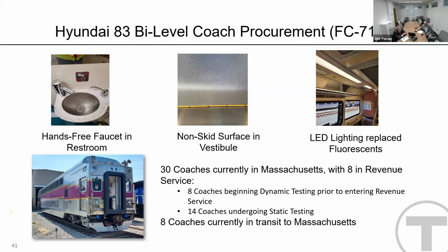We've got 8 coaches that have entered revenue service, and we're dynamically testing. Even today, we're doing cab signal testing on 4 coaches, and we'll be doing dynamic testing through this week and next week on those 8 that are identified there, and 14 are undergoing static testing, which is everything is checked to make sure it's rail ready before it's introduced onto dynamic testing.